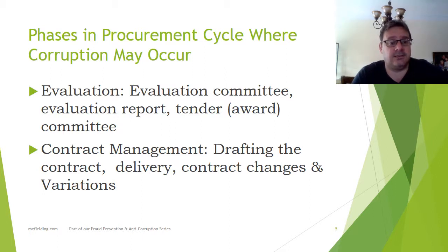So if they decide that 20%, for example, has been changed in the contract, then the contract is cancelled and you have to re-tender. Now 20% is easy to calculate when you're looking at cost, and it will always, either it will have gone up or the volume of goods will have gone down by 20%. But when you're looking at certain other things, is the guy not the guy we contracted with? The guy's a worldwide specialist in fraud, but unfortunately he's here to teach 16th century Mexican art. Seen that one before. Does that constitute 20% difference? So again, if we're getting to the point where the contract is changing and changing and changing, and we're getting variation after variation, then you have to draw a line in the sand.